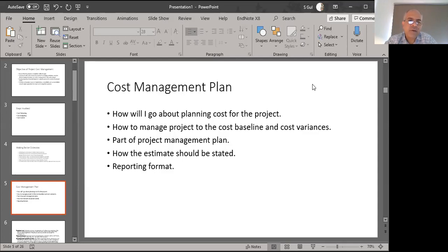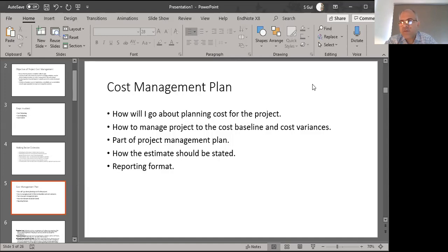What does the cost management plan do? It answers: how do I go about planning the cost for my project, and how do I manage the project cost baseline and any variances I encounter? It becomes a part of your larger project management plan. It also talks about how the different estimates are going to be stated and what the reporting format will be when we are actually expending money.